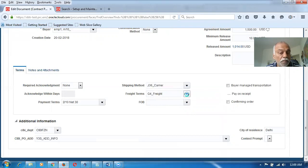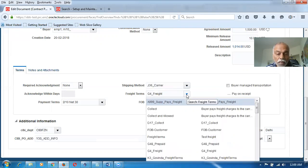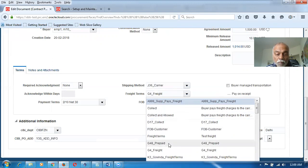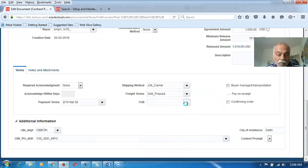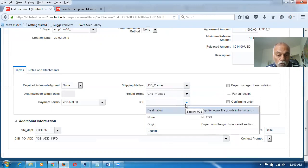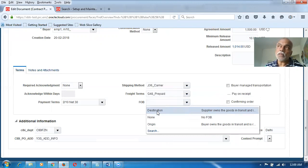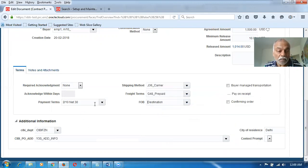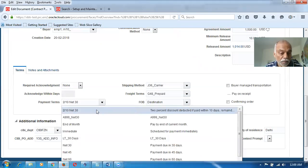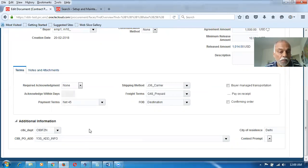There is collection allowed, prepaid — you have to pay the freight. And then FOB: the original destination. Destination means till it reaches our place, it is the supplier's responsibility — the transit insurance, the octroi, the road tax, toll tax, whatever is there, it is all his responsibility. And the payment terms: I will not pay by 2x10 net 30, but instead net 45 — after 45 days only you will get payment. Acknowledgement requires supply scheduling mode.